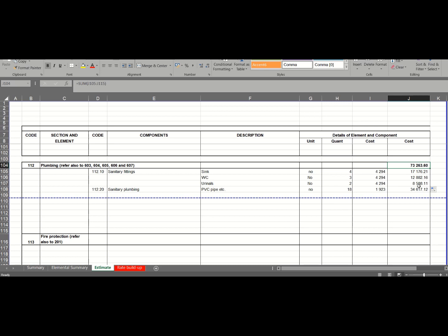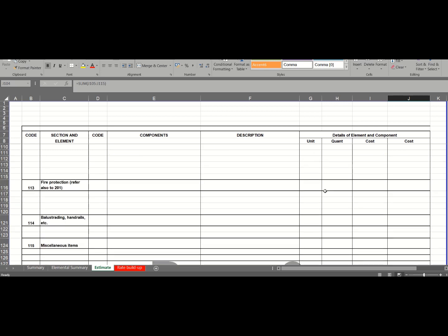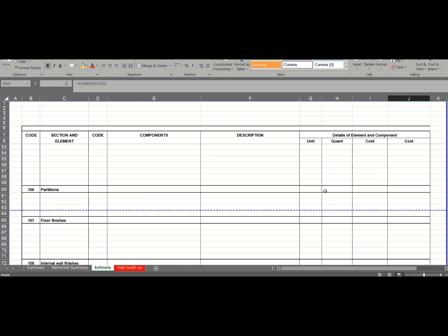Okay, a very nice check here is also just to calculate what your rate per square meter is, and to compare that maybe with your historical bill, whether it's in the ballpark or not. Okay, so I think that's more or less it.